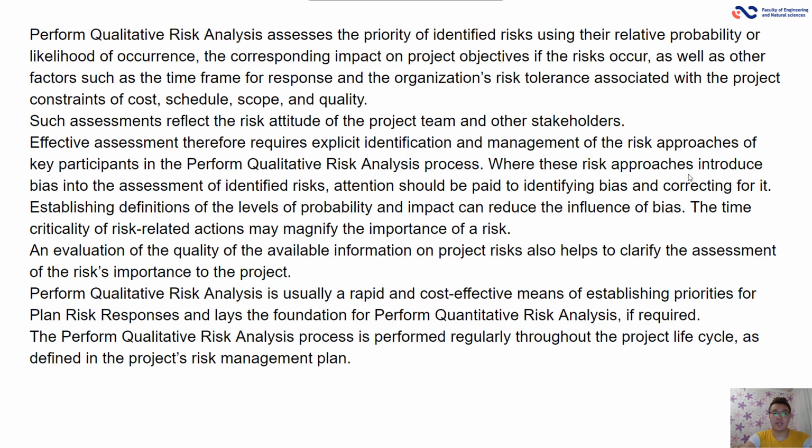Perform qualitative risk analysis: assess the priority of identified risk using their relative probability or likelihood of occurrence, the corresponding impact on project objectives if the risk occurs, as well as other factors such as time frame for response and the organization's risk tolerance associated with the project constraints of cost, schedule, scope, and quality.